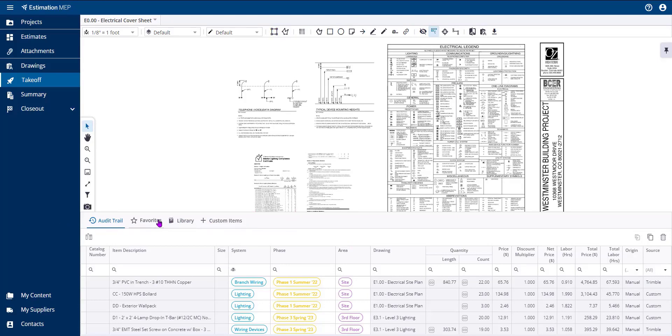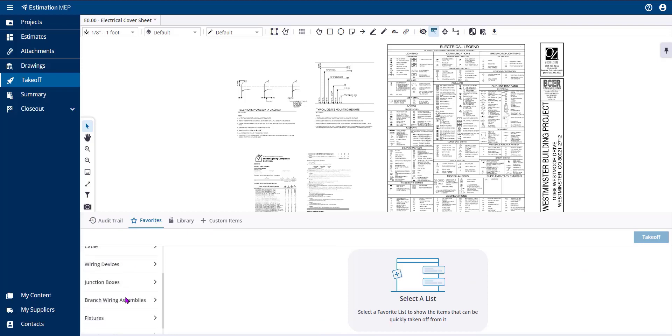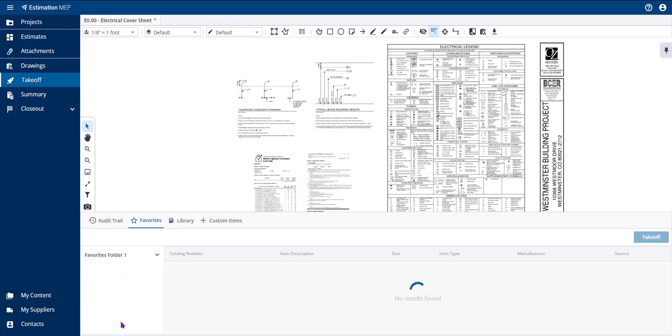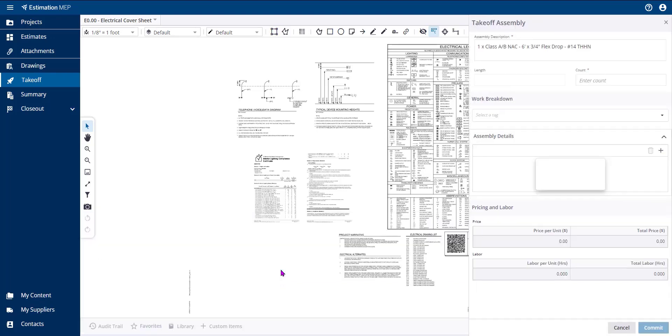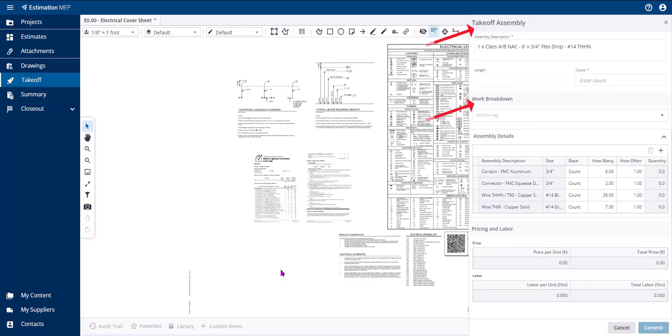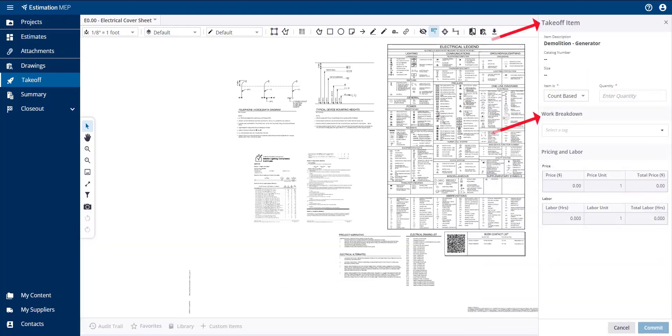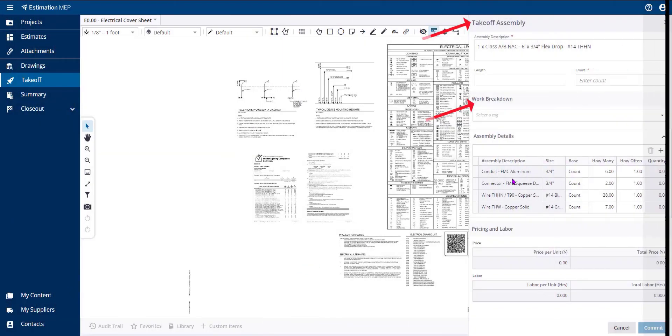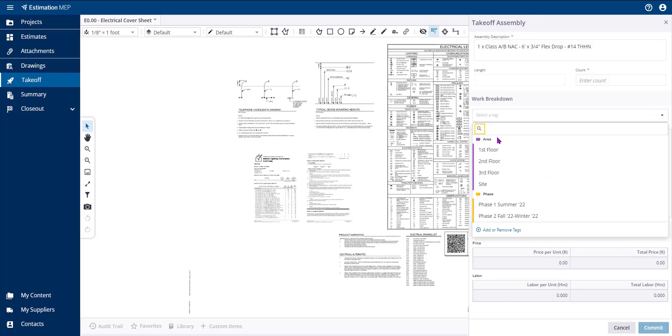You can assign work breakdown structures in two ways. You can choose to assign work breakdown structures within the Takeoff Assembly pane or Takeoff Item pane as applicable that appears on the right-hand side of the screen when performing a takeoff.